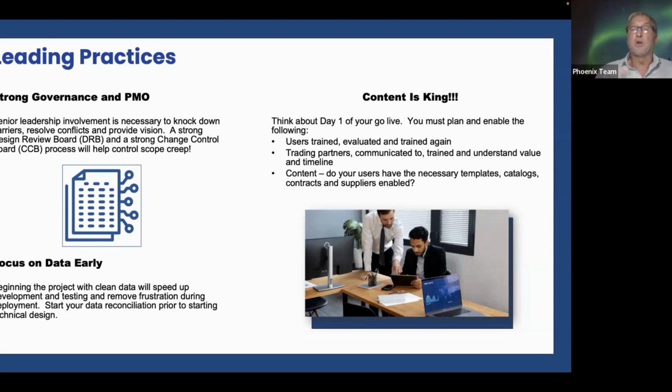Additionally, focus on data early, specifically with your supplier base. And again, I'm talking about procurement specifically. With your supplier base, you need to make sure that you reconcile your supplier base prior to your implementation. If you don't, that's just another step you have to do later. Why is that important? Because when you're talking about procurement, all of your trading partners and suppliers need to be fully vetted.